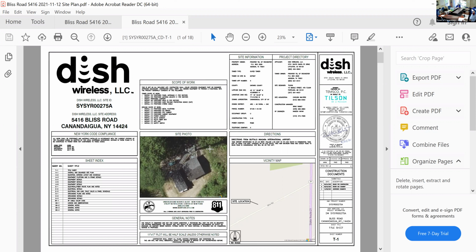Okay, one of the items that we did go back and forth on is the site plan application. We need to fill one of those out, and we need an as-built, kind of an existing features plan, a survey. Yeah, and we did add a lot of details to the site plan that we sent in on Friday. So stamped by a surveyor with boundary on it? It's stamped by an engineer. Oh, no. So we need, again, per the site plan checklist that I sent you, there's sections on existing features plan, survey with boundary and stuff like that. So that's what we need.